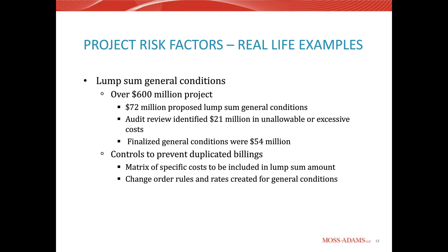Also, where lump sum general conditions becomes a problem is with change orders. Depending on the type of change order, sometimes general contractors are entitled to general conditions. A lot of times if the schedule is impacted, meaning the project's going to go longer than anticipated due to a change order resulting from an owner change or design error, if it's a bid build job, having rates or what's allowed to be included as far as general conditions in the change orders is critical.